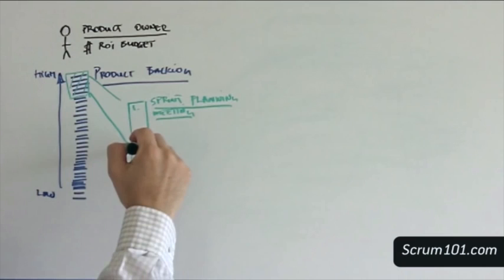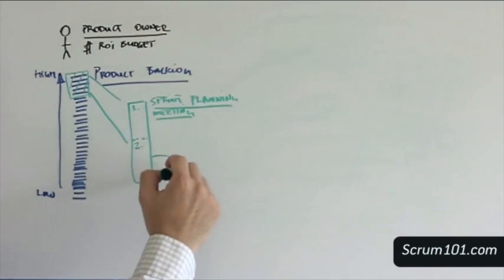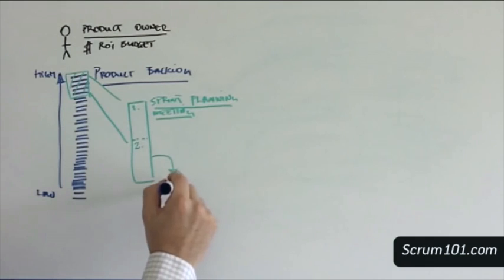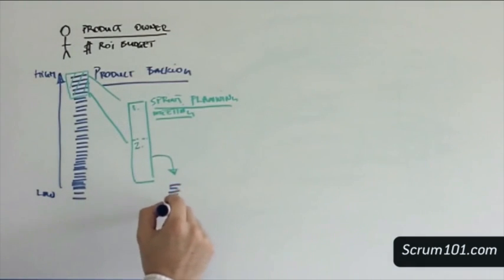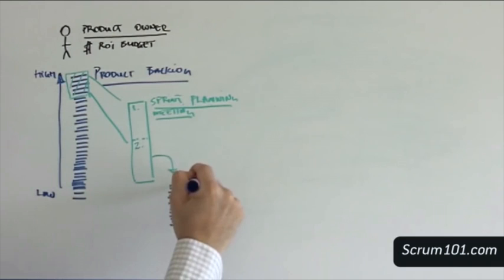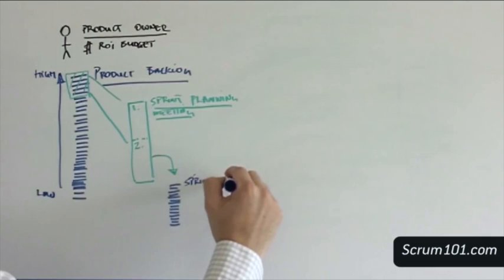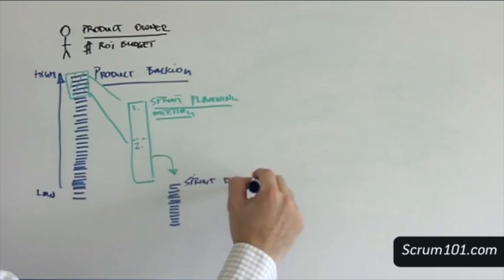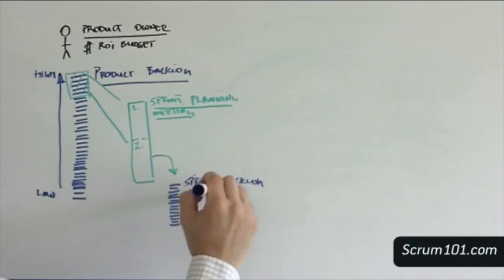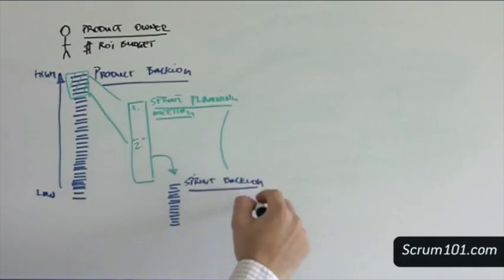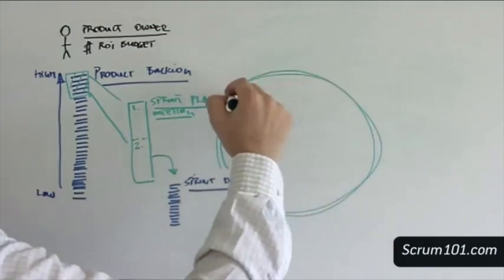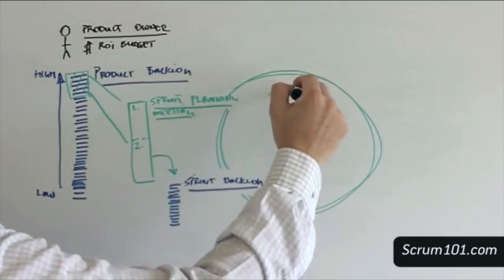The team proceed to Sprint Planning Meeting Part 2. This meeting is a design and architecture meeting for the team, by the team, where they discuss strategies to meet their forecasts. The team dissects their work into a list of smaller, actionable tasks. This is called the Sprint Backlog. Once the Sprint Backlog is formed, the team can begin a sprint.